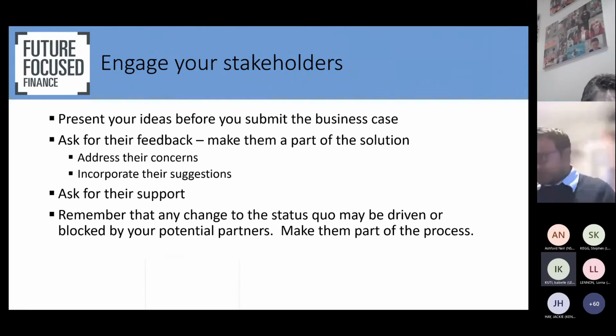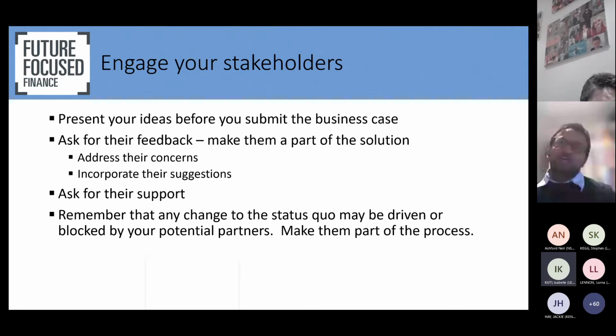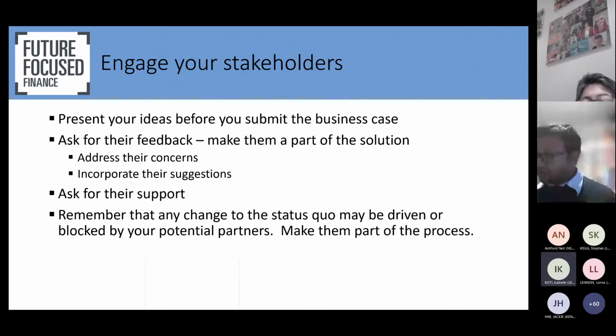But if it's a big bit of money, you might need to go in towards a new financial year, or at least ask for the money to start in a new financial year, where there's an increase in funding. Particularly if you're asking in September or October for the next financial year, that's a very good way of doing it, because it can then be built into the negotiations with your commissioners, if you're a provider organisation.